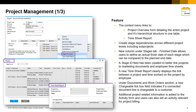You now have the ability to create stage dependencies across different project levels including sub-projects. A new column under the Stages tab, Finished Date, allows users to define an actual finished date of each stage, which can be compared to the planned end date. A Stage ID field has also been created to better link projects to marketing documents and employee timesheets. Under the documents and work orders section, a new chargeable tick box field indicates if a connected document line is chargeable to a customer.